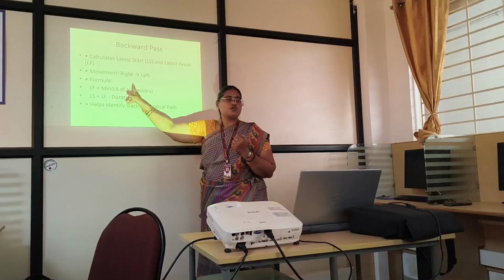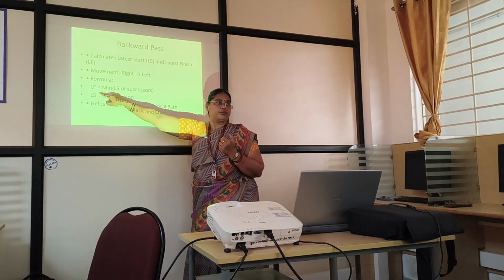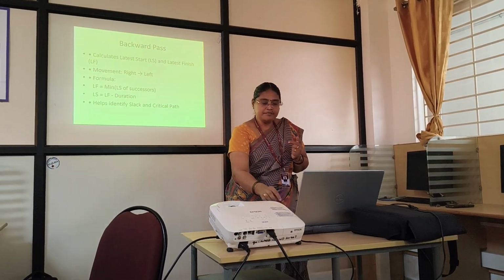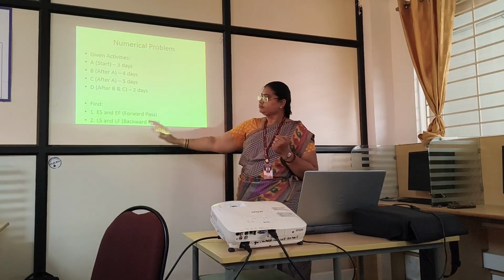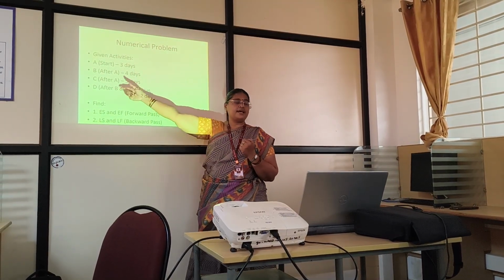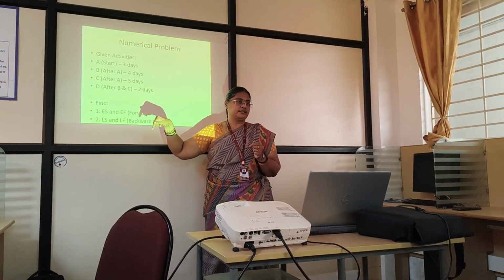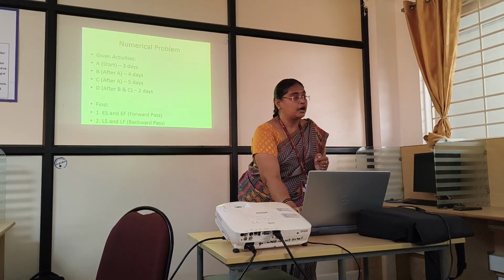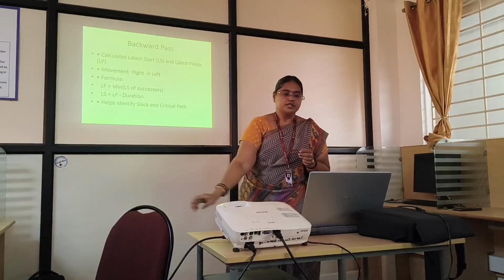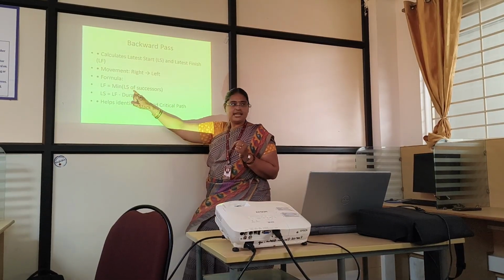min LS of successor. That is your LF value. Minimum. What is the minimum value here? Tell me. Which one is successor? Minimum. We are going to be taking like that. So directly we will not count up all the duration. Okay. So min of LS of successor.